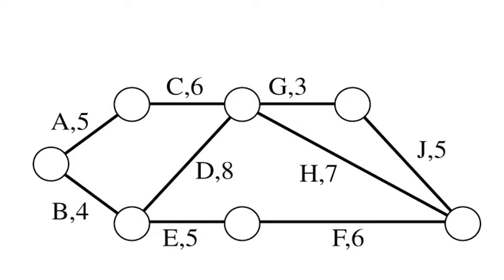Let's have a look at another network. We're going to forward scan for the earliest completion time, and then we're going to backward scan for the latest completion time. Then we'll look at the float times and critical paths as well. So let's draw some lines down the middle of our nodes. So I'm just going to do this first of all. So remember, on the left hand side of our node are the early times, and on the right hand side are our late times. We forward scan to fill in the left hand side or our early times.